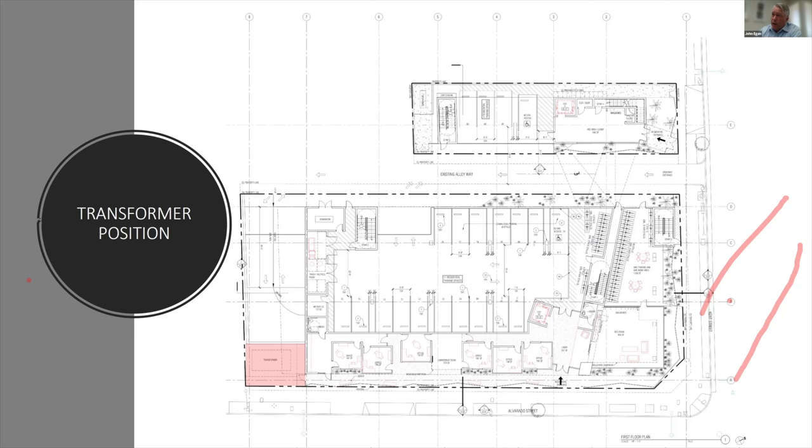The reason they wanted it on site was that they didn't want to have the liability of damaging the sidewalks when they're doing maintenance on a transformer. So the Department of Water and Power was increasing the size of these transformers by about twice. And to give you an idea, if you have a five-story building, that's five units right there that you're knocking out of the building because you can't build over it. And if it's twice as large, it's going to have a higher impact as well.